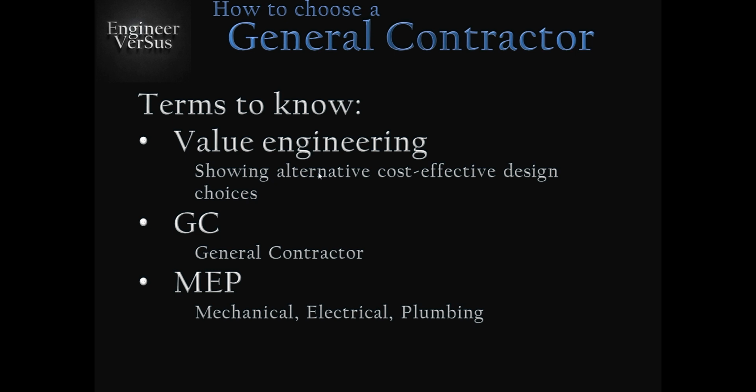That's never good. So where the plumbing contractor comes in after the electrical and they run some plumbing work over the electrical panels, it's against code. You can't do these things. So how does that work out in order to avoid any sort of inspection mishaps on the project? So if you say, how is the MEP work going to be handled with the general contractor?